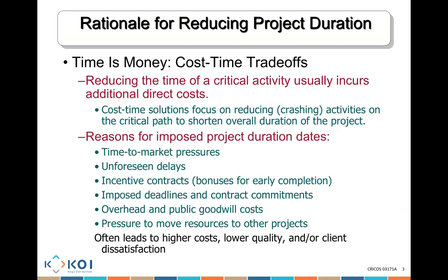Another reason is that there's an overhead and public goodwill cost, overhead cost. For example, you might have to rent a space for as long as the project is going to run. So if the project finishes earlier, you're going to pay less money for all of that overhead.